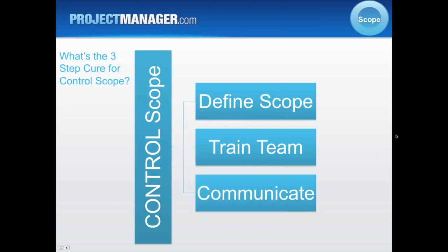You could coach your team members to say something like, hey, that's a great idea. Could you maybe email that to me, and I'll submit it to the change control board? Or something as simple as, I'm not sure, can I get back to you? Or again, just a simple email request. That way, the team member can email the project manager, and then you as the project manager can take it from there and get it to the change control process. But I think it's just a constant training thing. And paint them a picture for what goes wrong.